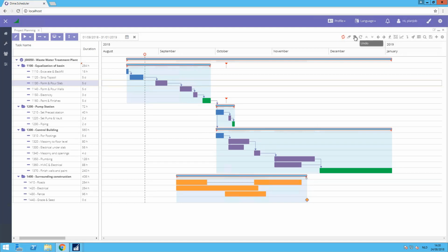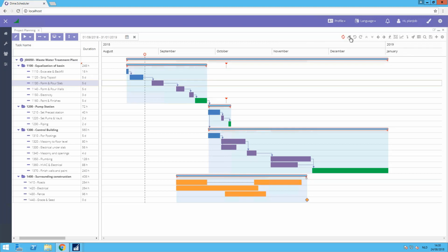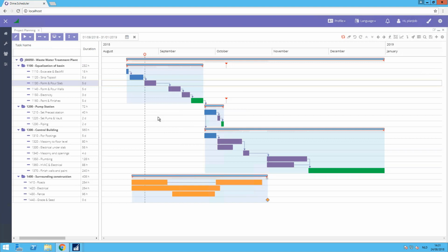You have undo, redo buttons here to undo and redo the changes. If you say I want to start from scratch, that is possible because in contrast to the actual plan boards where everything is saved in real time to the database, that is not the case with the Gantt chart. You can see these arrows here, the red arrows here. That means something was changed and is not synced yet. So you could make a plan or change one of the tasks and see what the result would be in all the other tasks without actually changing it, and go back to the initial version by hitting the reset button here. In that case, the project will reload and you will have the project as it was before, since I did not save anything to my plan boards.